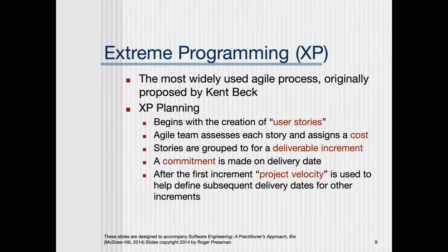And then we go through increments. When's the first increment done? Then the second increment done. That will give us fairly early on a project velocity. That means how long it's taking for us to develop, we're doing so many user cases per week. Okay, so we can then project out when the other increments are likely to be, realizing, of course, that we often have more complex development as we go along.